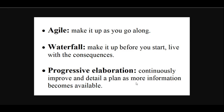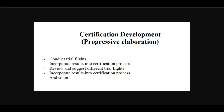Please note everything is new and starts from blank for the certification. Some tasks and scopes for the certification may not be known in advance. CAAC needs data to build the certification. The nature of the certification project development is close to progressive elaboration. In this method, EHang conducts trial flights. The flight results are then incorporated into the certification process. Further review and suggestions are then made to conduct different flights. The results are incorporated again, and the iteration may go until completion.